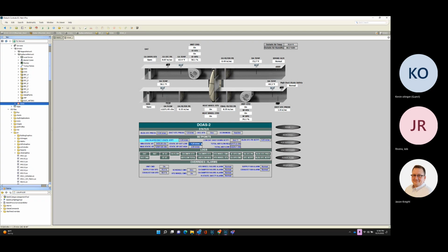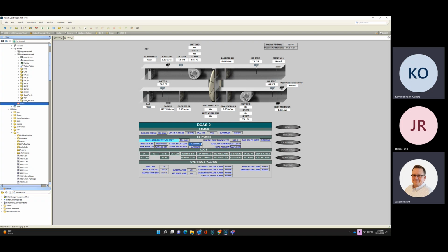Now, there's a couple of units that they're still working out some issues with. There's a unit where the exhaust fan runs faster than a supply fan. And that's between the balancer and the engineer and what the mechanical equipment can do. I don't want to go too far into that. That's why we're not handing this over yet, because there's still some things that need to be worked out.